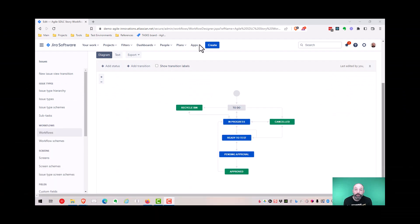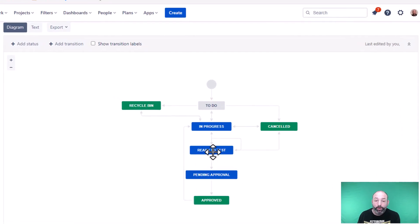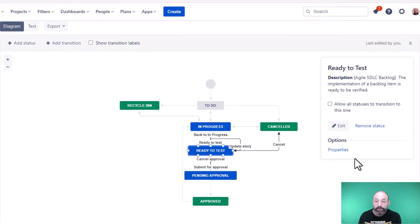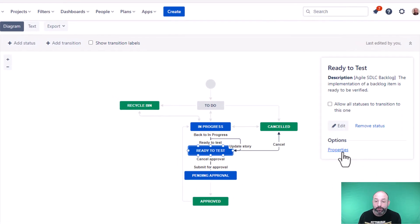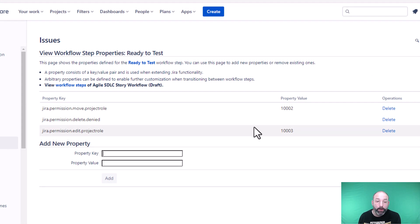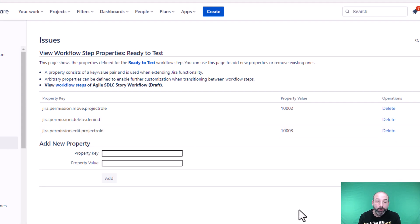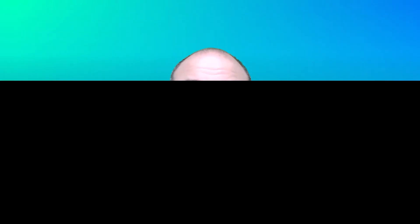We also saw that the verification plan and other fields were locked in the ready to test status. We did that using the workflow status properties. You can see there's a few properties here that block moving, deleting, editing. That last property is the one that locked the fields for regular users. If you want to learn more about locking issues by workflow status, check out some of my other videos on that.